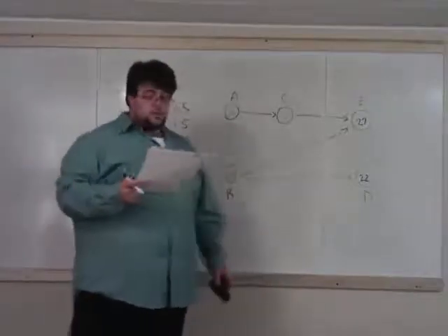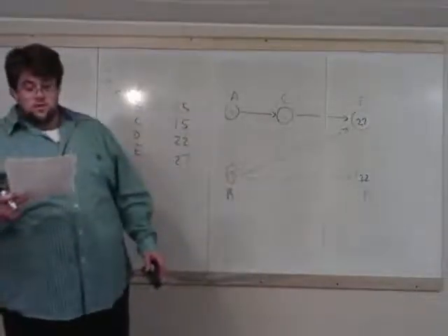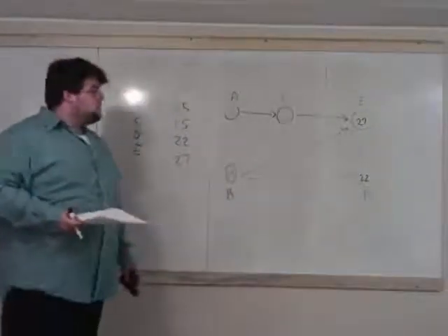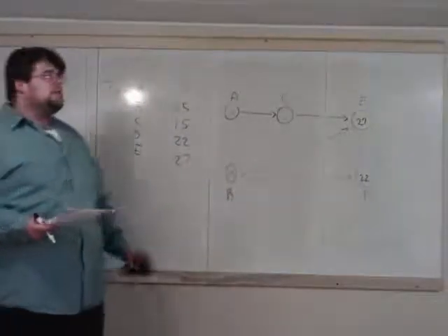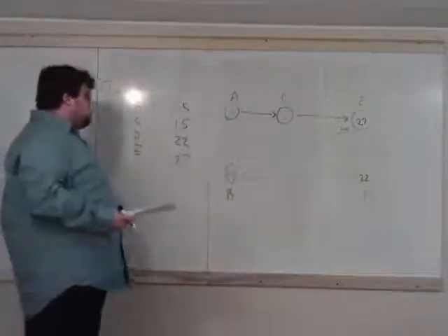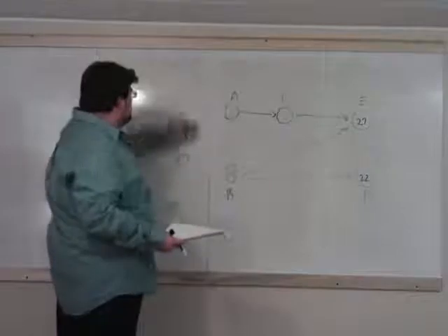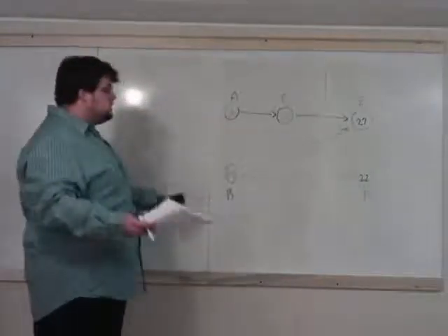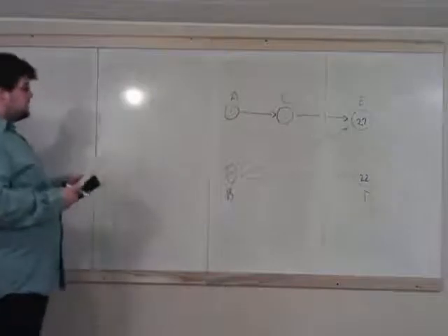But this says that you must unload cargo before loading new passengers. And the textbook actually addressed that, and they said it was because of regulation or union requirements. So in case you're wondering why B is done before E, either regulation or union or both.